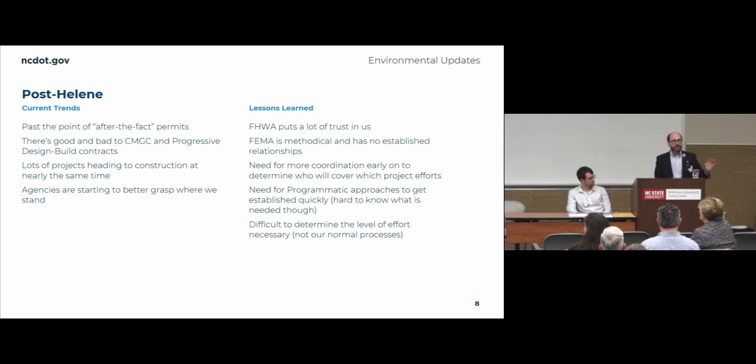We're needing to get permits before we take action moving forward. There shouldn't really be anything moving forward that we're just going out there with equipment in streams or rivers without having permits in advance.